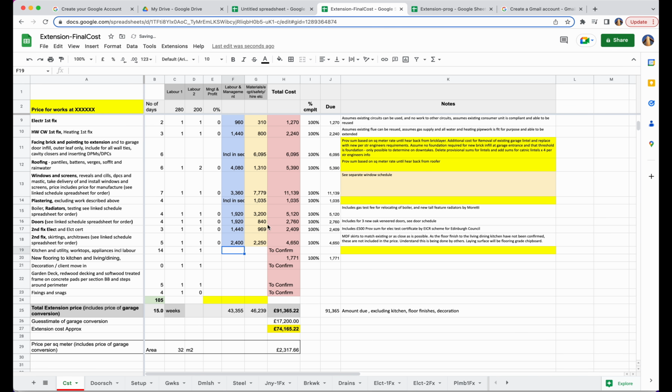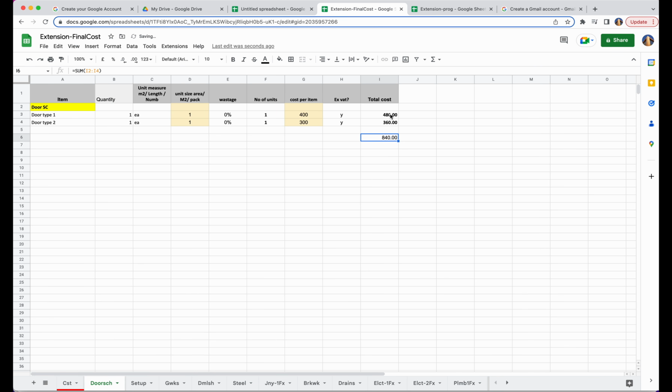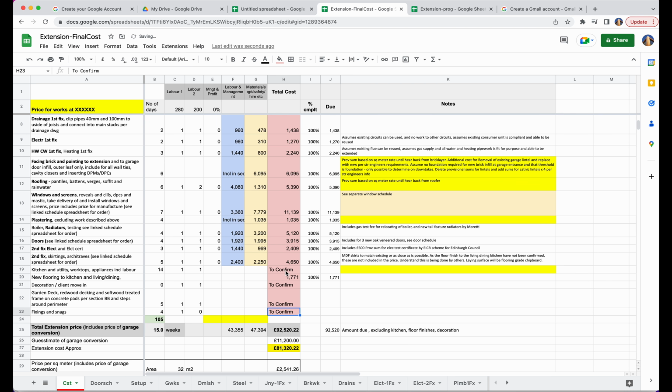Now that's done, we need the labour, and unlike the materials we just talked about, which are based on what your local merchants are selling to you at, labour can fluctuate wildly, and it's based on several things. For example, your powers of negotiation, the detail of the information you're providing to your contractor, the location of the project, even the type of customer that you are. All these things can affect the labour price.